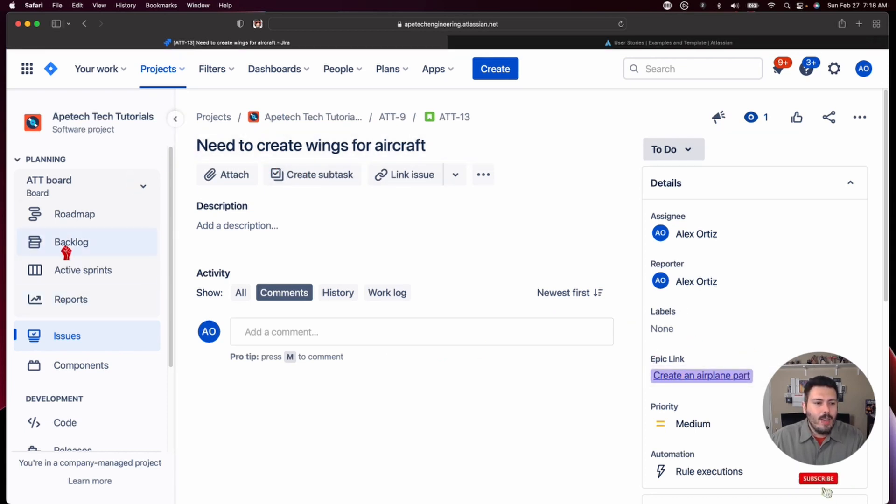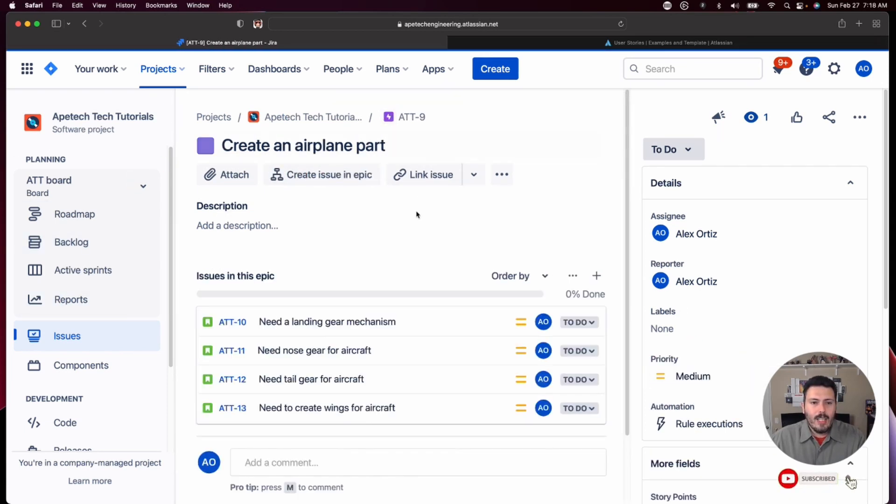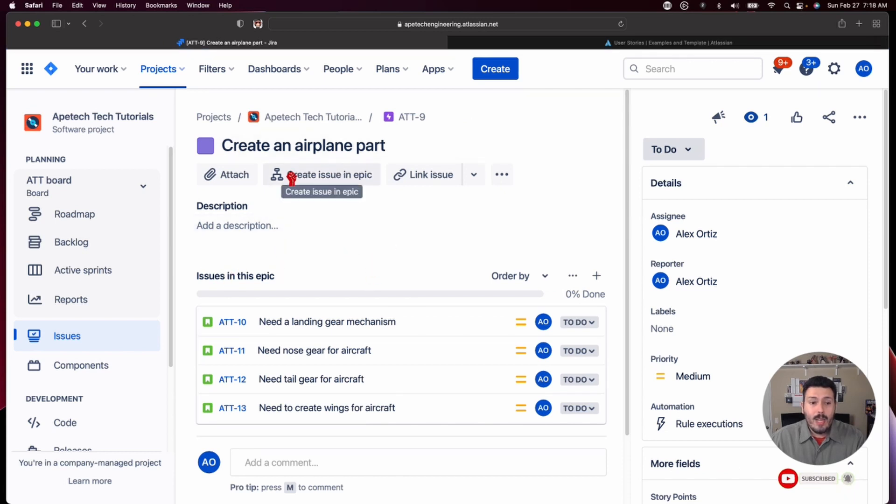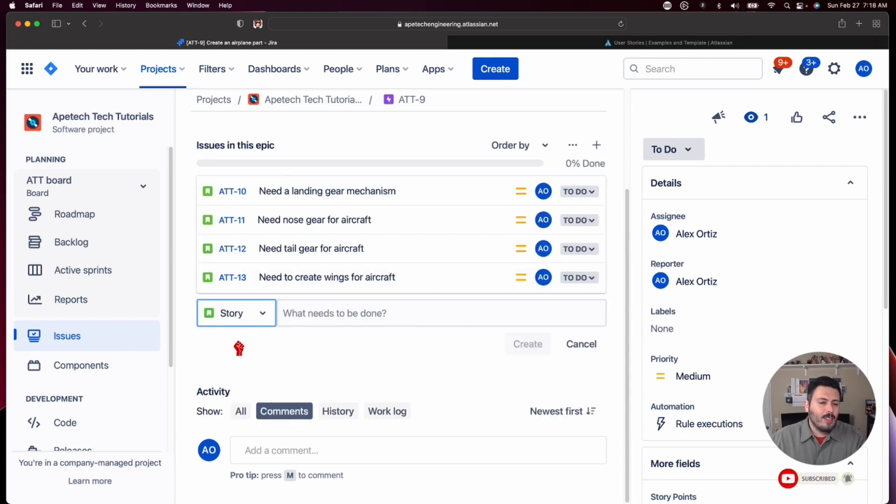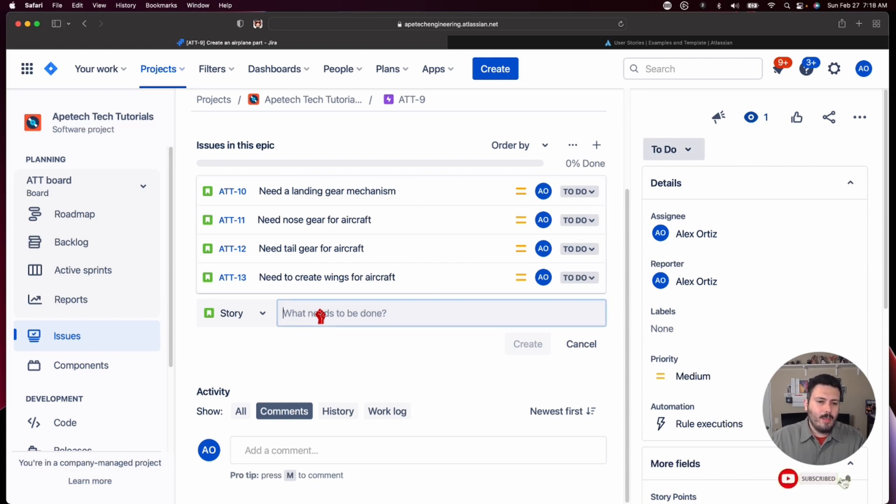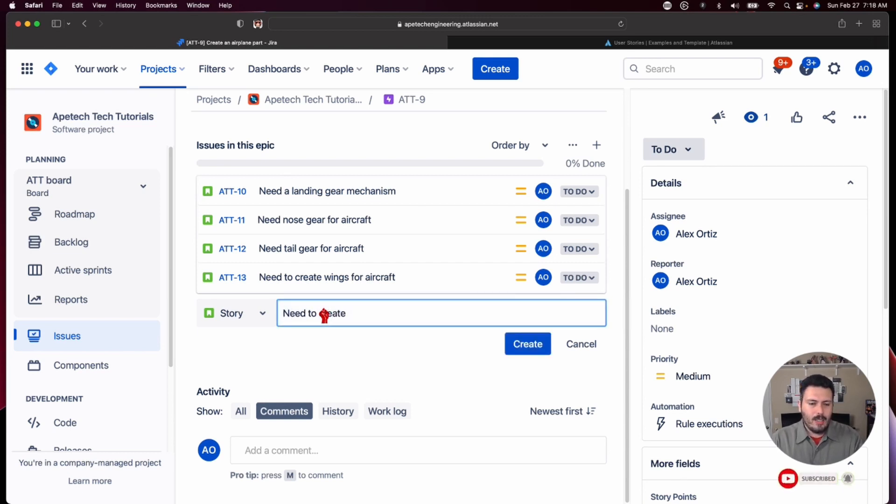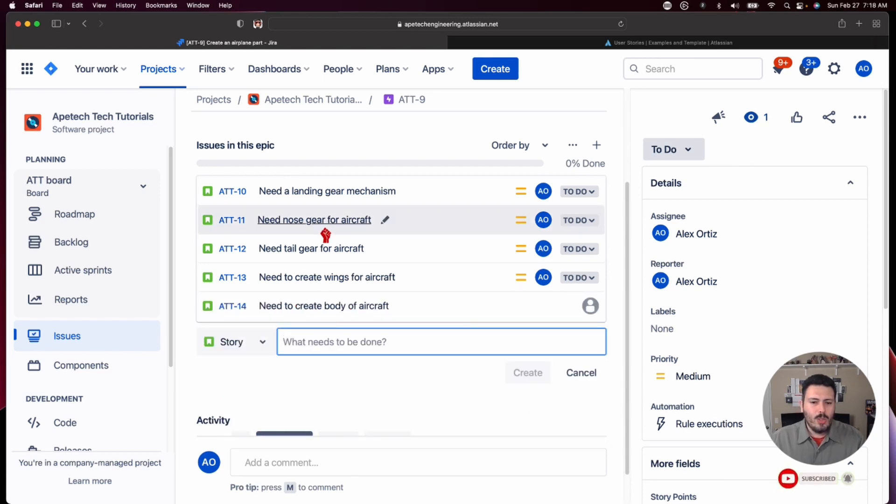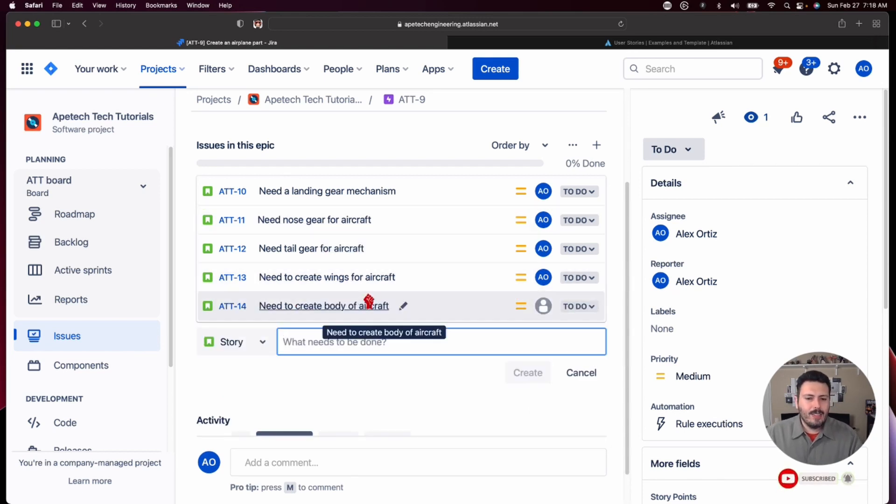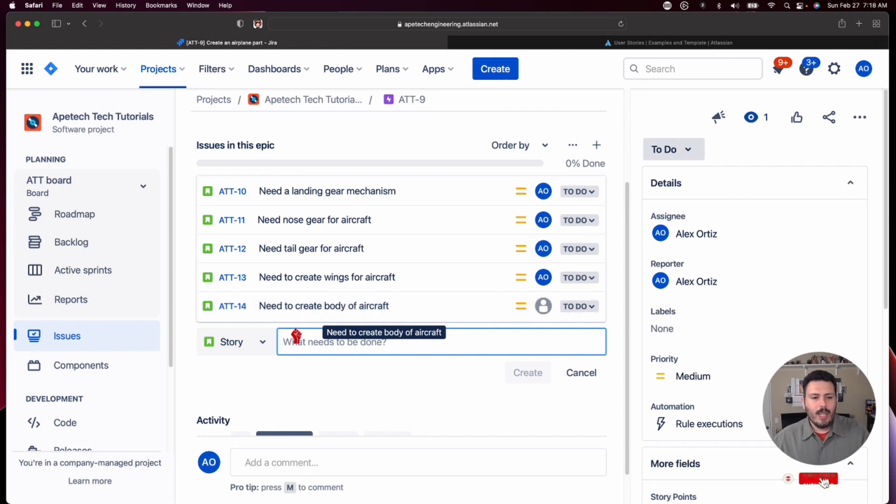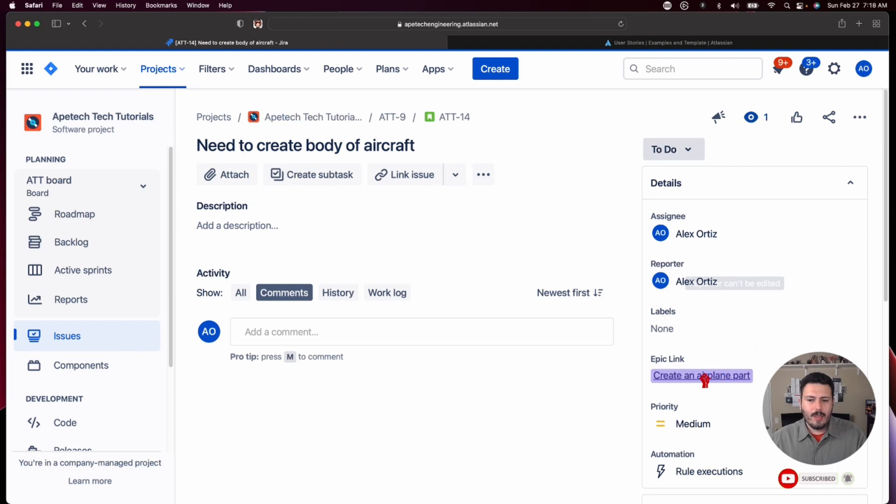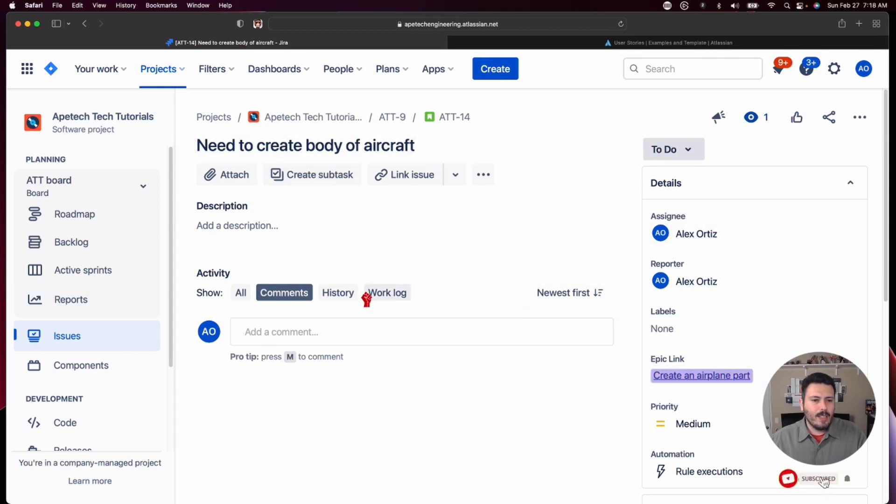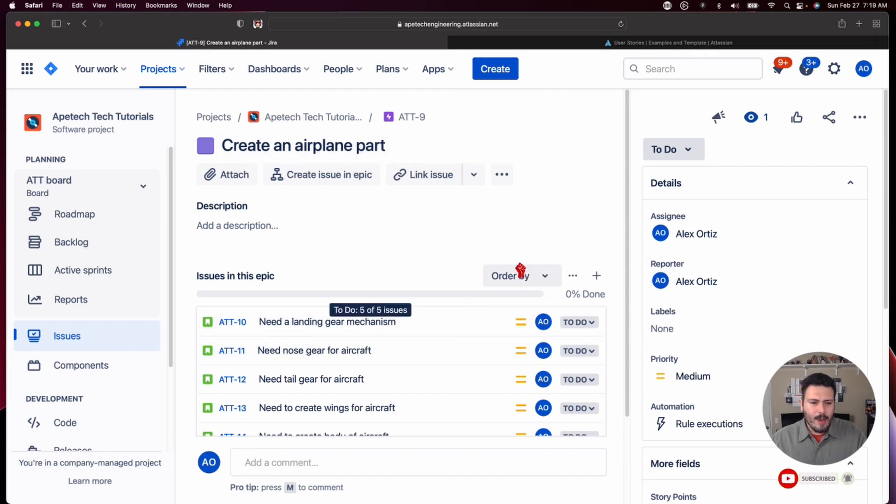Now the other way then is that I was telling you is you don't have to hit the create button here. You can actually just come and click the little plus button. And when you click on the little plus button, again, defaults to a task, change it to a story, change it to whatever you want it to be. And then you can put need to create body of aircraft. And when you do that, again, same things happening here. We got the association of the epic. If I open it up, the epic link is created. The assignee is happening all autonomously here. And so those are five different ways.